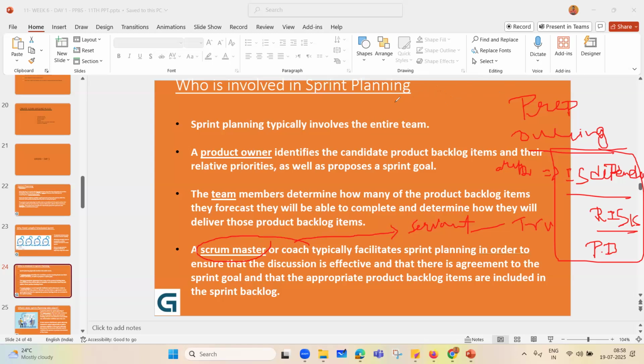Yes? Yes. So if they need to maintain any RAID log, what is a RAID log? Who can tell me? It's a document that is used during the specific sprint that lists down the risks, assumptions, issues, and dependencies. Yes, absolutely right. So you can maintain a grid, a spreadsheet, or a document where you can take a note of any risk, assumption, issues, or dependencies. With me so far, everyone?